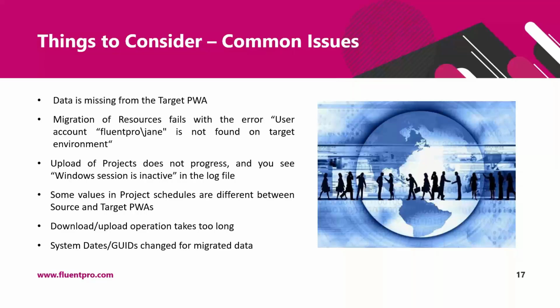Also, system dates and GUIDs are changed for the migration data. During data upload, PWA configuration, projects, and SharePoint content entities are created in the destination PWA. Therefore, system read-only fields like created, last published, and last modified are set to the date of migration, and they will not be the same as in the source PWA. If, for example, you use these dates in your reports, you need to understand this limitation in terms of your migration.